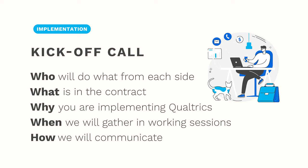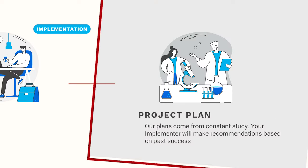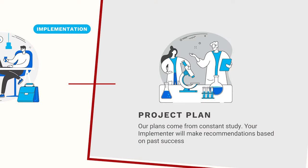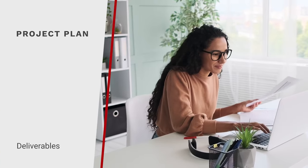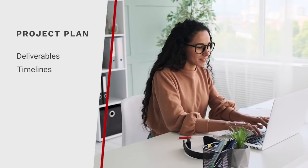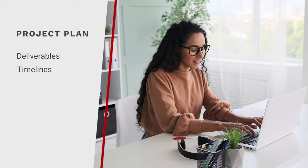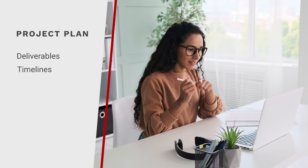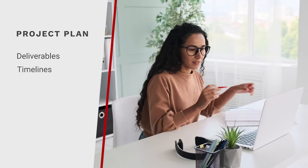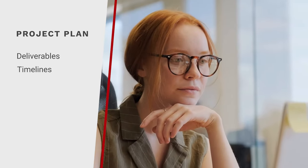During the kickoff call, you and your implementer will develop a written project plan. Our team starts with a template built from insights captured over thousands of Qualtrics projects, and your implementer will make recommendations based on the success of projects similar to yours. These best practices include standard deliverables and timelines, but your implementer will also review the business impact you're hoping to achieve and your specific timeline constraints to customize the project plan to best match your objectives.